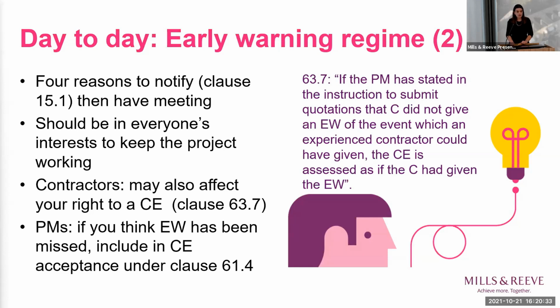Project managers, note from that clause, if you think the early warning has been missed, you have to say so when you accept the CE and ask for a quotation.